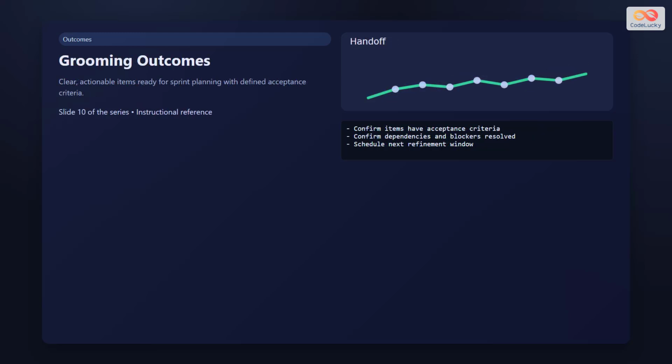Using templates helps maintain consistency in your backlog. A basic template includes the user story statement, acceptance criteria, and definition of done. For example, as a product owner, I want to validate if a feature is viable. As a developer, I need clear acceptance tests. As a tester, I require defined exit criteria. Templates ensure nothing is missed and everyone understands expectations.